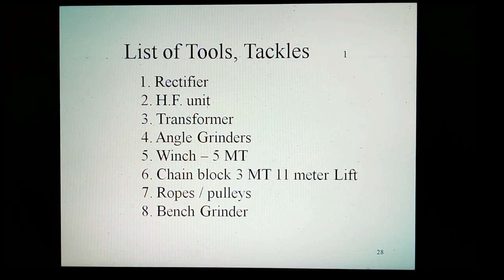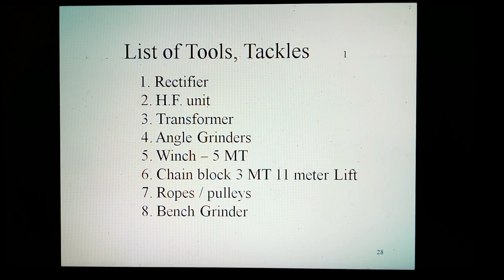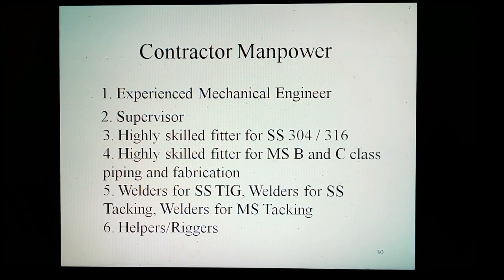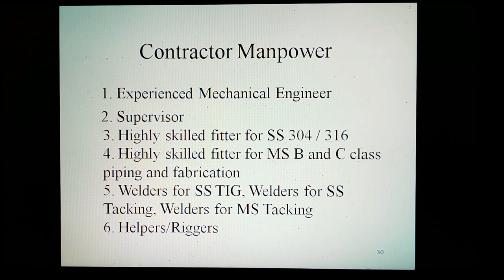List of tools, tackles, and machinery required to carry out piping works, to be arranged by the contractor: rectifier, HF unit, transformer, grinder AG7, winch 5 metric tons, chain block 3 metric tons with 11-meter lift, ropes and pulleys, SF4 grinder, hacksaw, flat files, etc., and other tools and tackles such as pipe vise, GQ4 grinder, abrasive cutting machine, and gas cutting equipment. Contractor manpower list for piping fabrication and erection: experienced mechanical engineer as in-charge, supervisor, high-skilled fitter for SS304, high-skilled fitter for MS/CS piping and fabrication, welders for SS TIG, SS SMAW, and MS SMAW, plus helpers.